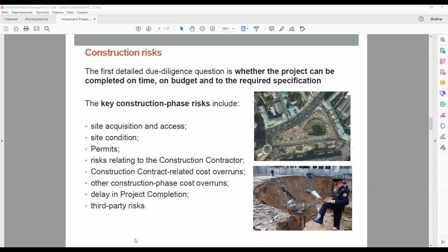The same principle applies to structures which will form a part of the project and so remain on the site. In some cases, the condition of the assets cannot be easily ascertained. There may be latent defects in old buildings, bridges, or tunnels, and clearly the lenders will not wish the project company to take on unknown risks of this type.